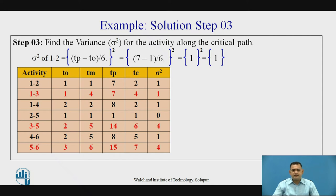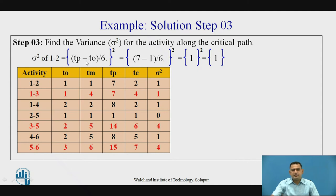The third step is finding the variance. We calculate the variance for each activity — not only along the critical path but for every activity. In the last column we get the variance using the formula: Variance = ((Tp - To) / 6)². Each activity's variance is listed accordingly.